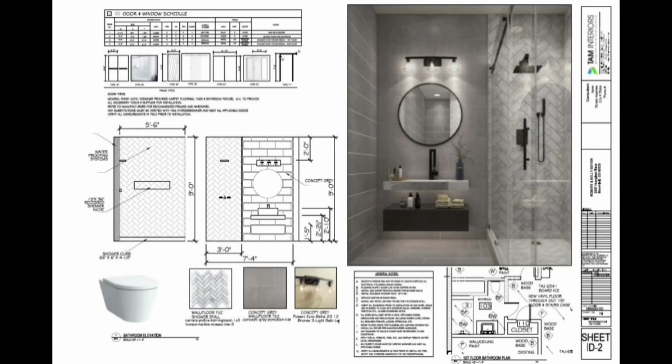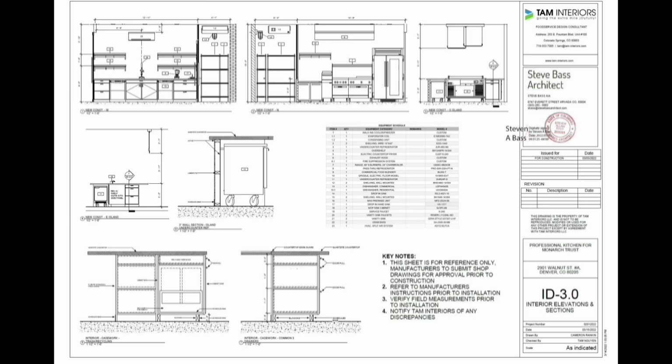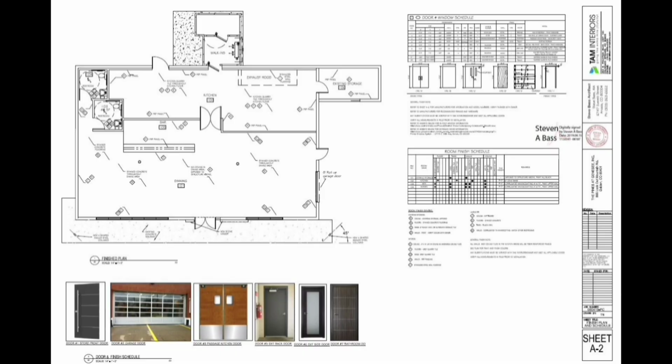Finalize and coordinate all drawings. Evolve your design development drawings into a fully annotated, dimensioned, and coordinated set. Finalize and update any changes made during the design development phase, and finalize and update any estimate.